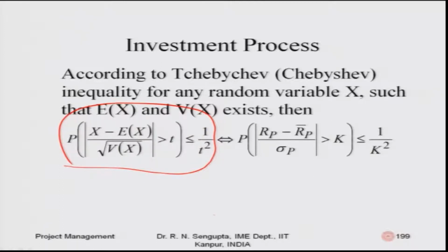So, if I have that and if this k value is given, I can find that using Chebyshev's inequality, and I can also rank different types of projects accordingly. So, this concept of normalizing them using the standard normal distribution, or using Chebyshev's inequality, where the first moment and the second moment exist without assuming anything about the distributions, can be utilized in a very big way and very conceptually, such that we get interesting results for the portfolio of projects.